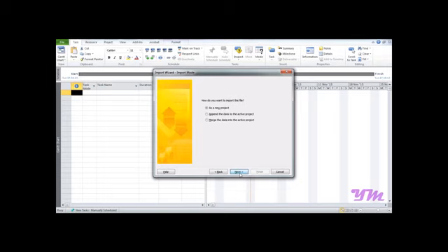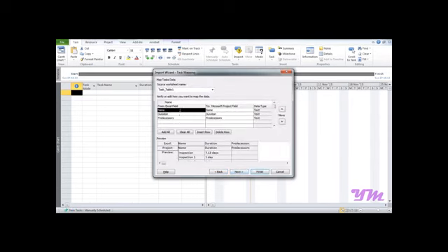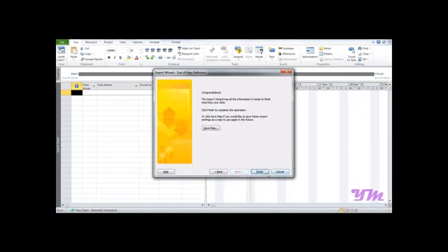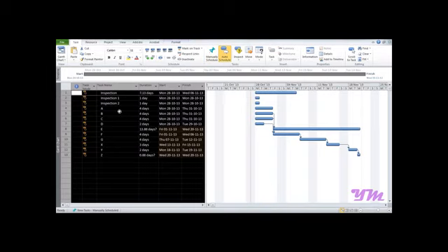Select next, new map, there's a new project, and we will select tasks as we want tasks only, and we also exported tasks only. Then press next. Finally it will show what all it contains, and you can remove any of the things you want, or you want to move any of them, and then you can press next, and on finish that same thing would be imported over here. Now we just need to press Ctrl J so that it's again auto scheduled as in our recorded macro. So this is about bringing data to and from Excel.